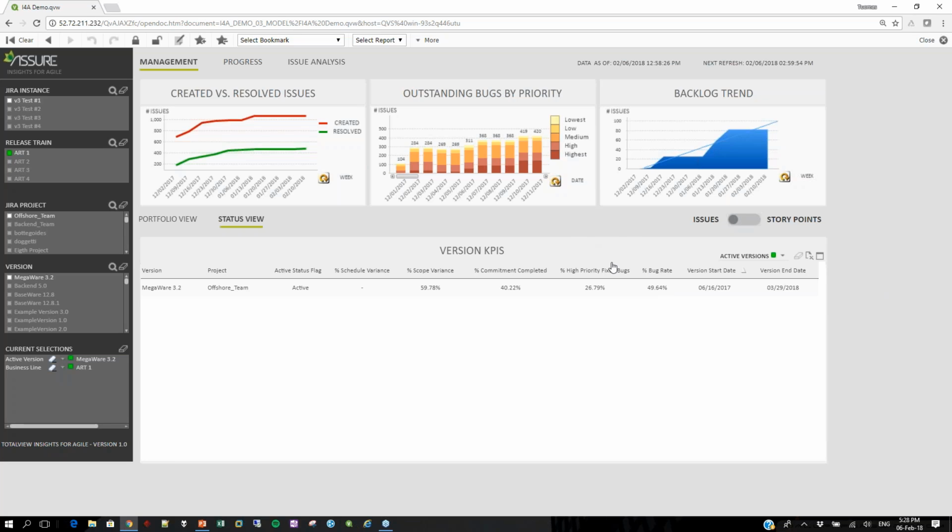Either I'm doing a megalomaniac maintenance project where I'm fixing my technical debt and just pulling a lot of bugs into the project, but then my backlog trend would be going down, because I would already have known those bugs as they are my technical debt. So clearly, because my backlog trend is going up and my bug rate is 50%, there is some kind of a quality issue. I'm pretty sure about it already.